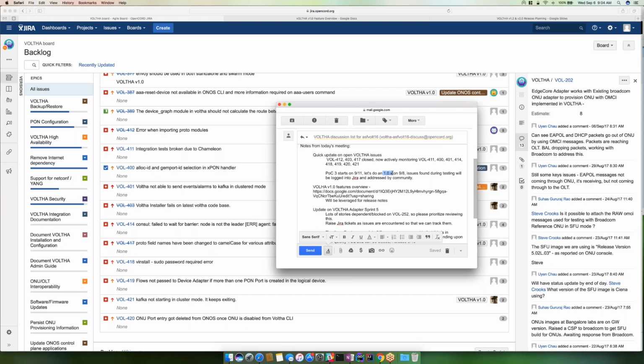So we could do a 1.0.x just to have it at a point where it enters POC, but it's going to have blockers. And there will be fixes that will roll into a 1.0.x if the 1.1 is too far out. Otherwise, you just have to pull from that support branch for testing as it continues for 2 weeks.